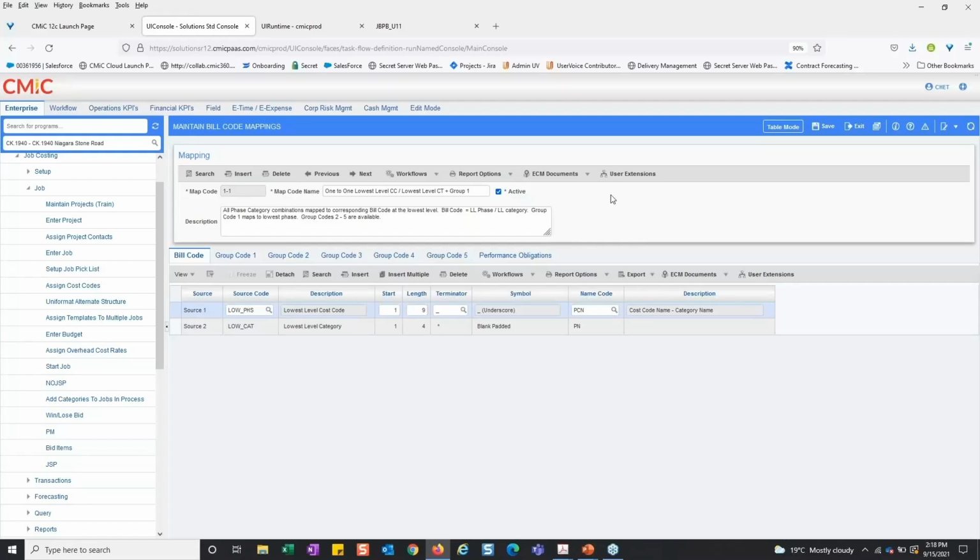So in my example where I have 03 as the controlling code, I have 03110 as the lowest code. If I were to add another level to this, like 03110.001, well then the .001 becomes my lowest level cost code. And having it at the lowest level is really important because it's going to avoid any errors and issues that you'll likely run into later on in the system.